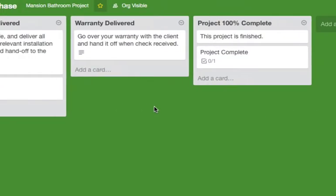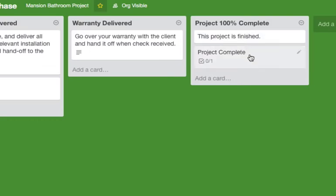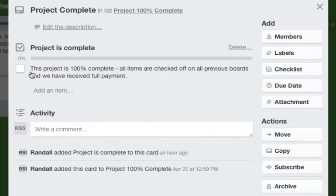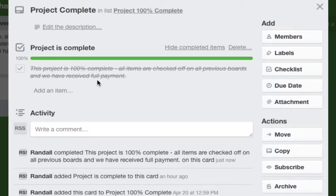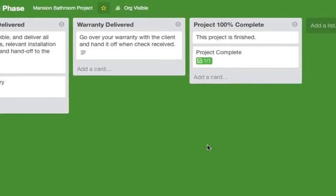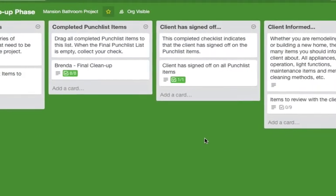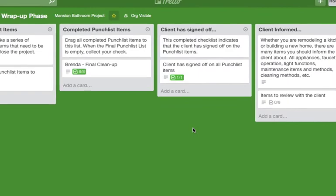And finally, the project is 100% complete. This is the most fun one to check off. You just go over here, check that off. It says this project is 100% complete, all items are checked off of all previous boards, and we have received full payment. Love that one.